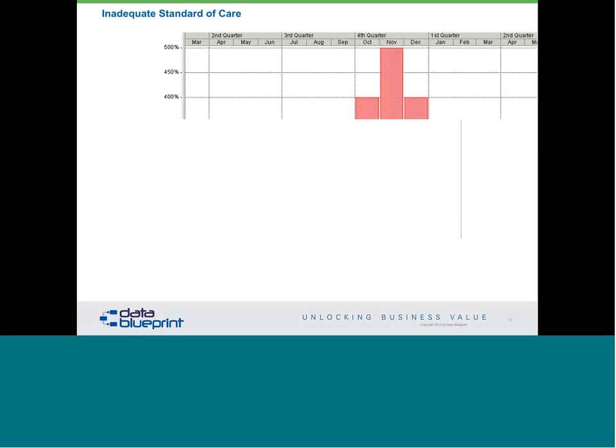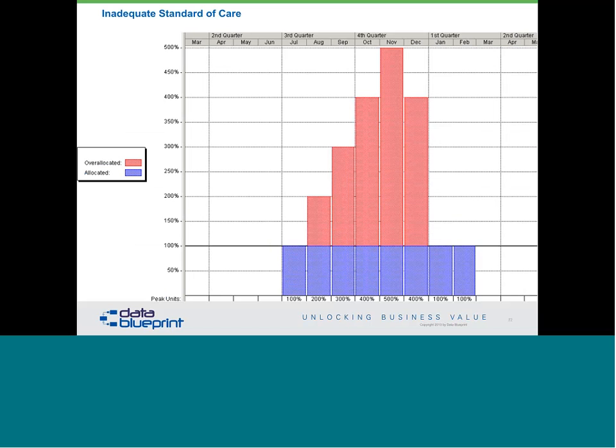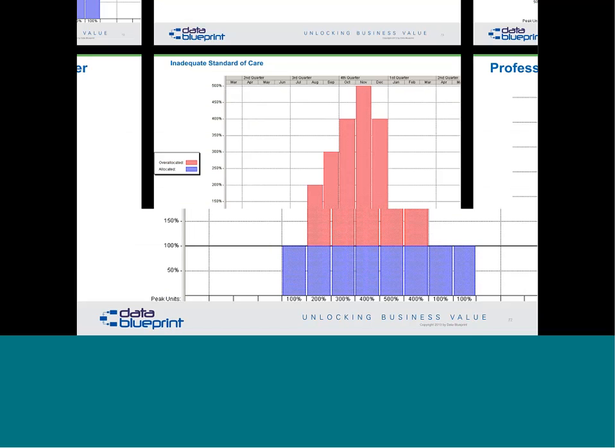Or here was an absolutely wonderful set of time allocated to certain tasks that they were able to look at. This is a single person who was going to have a very bad month. This was a 200-hour week instead of a 40-hour week. It's just not going to work.